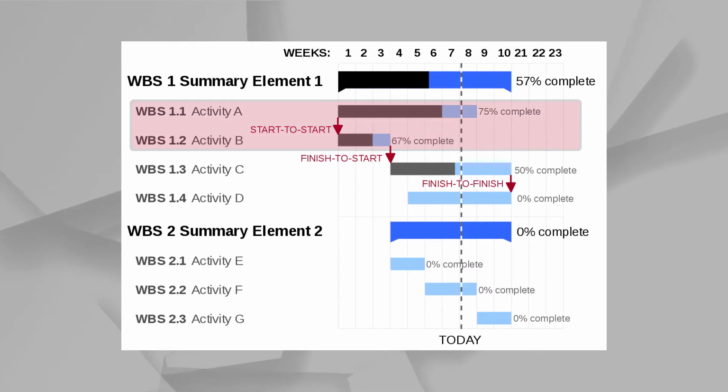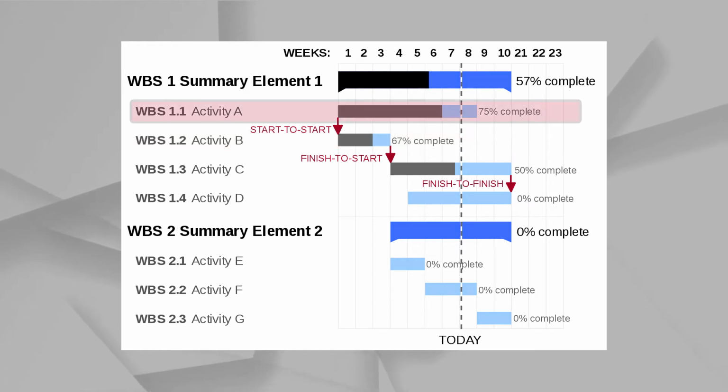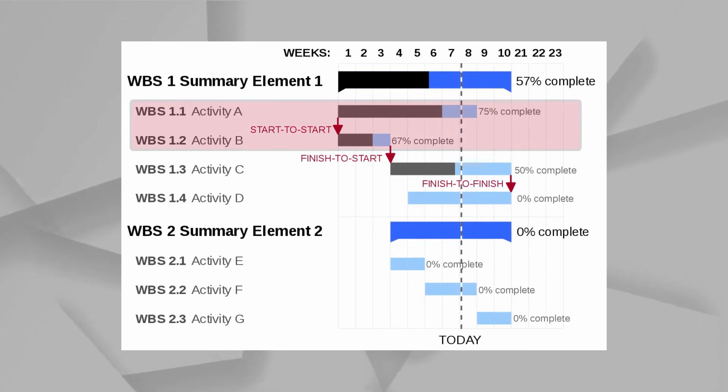Dependency 2, start to start. Whenever a task starts, its immediate dependency also has to start at the same time. For instance, when I was doing the activity B, I was not alone. I had my son with me, the activity A. So whenever I started picking up the goodies, I also asked my son to pick up the other half as well. So we were working in parallel for the same result, to the groceries.